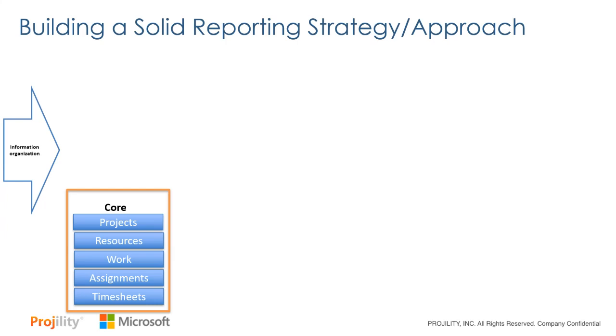There's projects and project-related information and metadata. The next step down is resources and resource-related information. There is work information in there. Then there's assignment. And assignments are the lowest building block that you're going to have in your project management application. So I'm taking a resource and a work and I'm smashing those together. And I'm creating this over a time phase period.